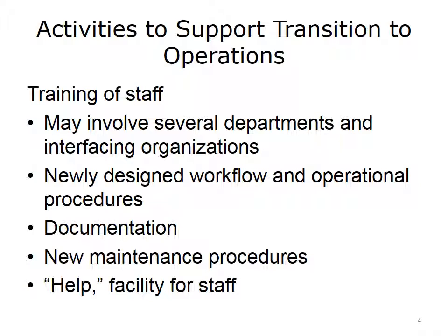There are several activities involved that will help you as you transition to operation. Make sure that the training on the new health IT system, service, or process is done well, that there is sufficient and effective documentation, and there is effective specification of any of the new operational procedures that arise. It is also important to have an ongoing help facility, especially online, with easy access. The quality of these activities can go a long way in determining the overall success of your project.